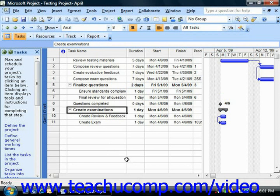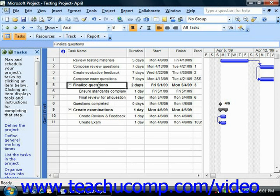Note that the duration of the phase or summary task has then been changed to indicate the duration of the subtasks.